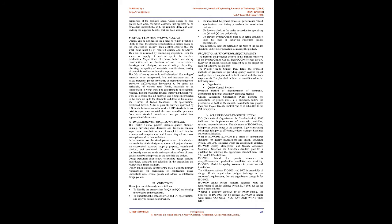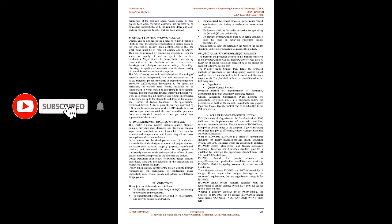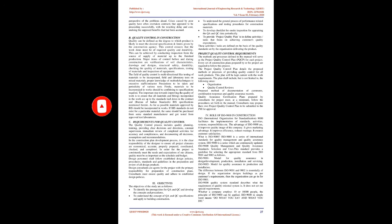C. Requirements for Quality Control. The quality control process includes quality planning, training, providing clear decisions and directions, constant supervision, immediate review of completed activities for accuracy and completeness, and documenting all decisions, assumptions, and recommendations. In the construction plan development process, it is the clear responsibility of the designer to ensure all project elements are economical, accurate, properly prepared, coordinated, checked, and completed.